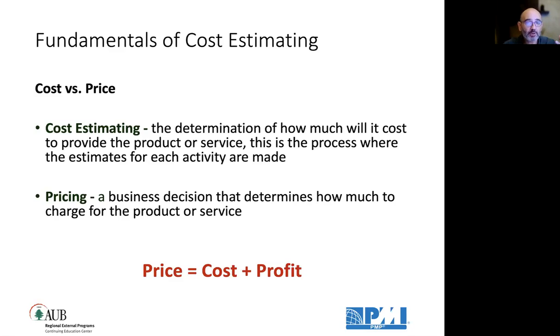And what you show to the customer is really the price, which is the cost plus the profit, which is an estimation. In procurement management we will see different types of contracts, and sometimes who bears the cost overrun depending on the agreement type or the contract type, whether it's lump sum or cost plus incentive or time and material type of agreements. But keep this in mind.